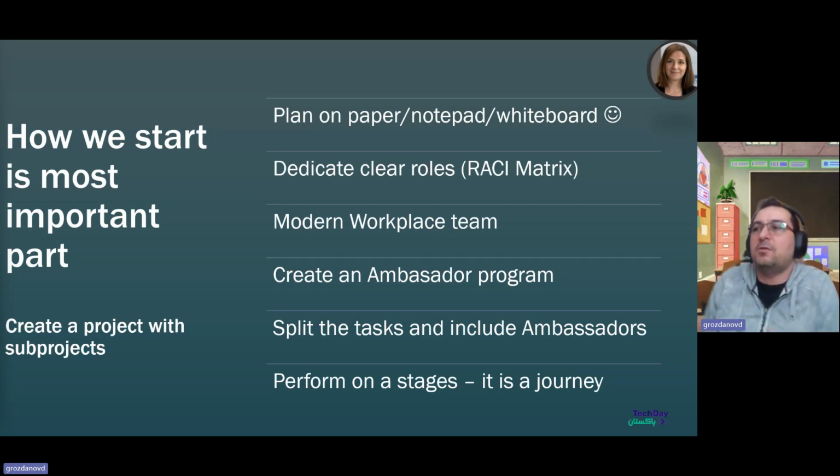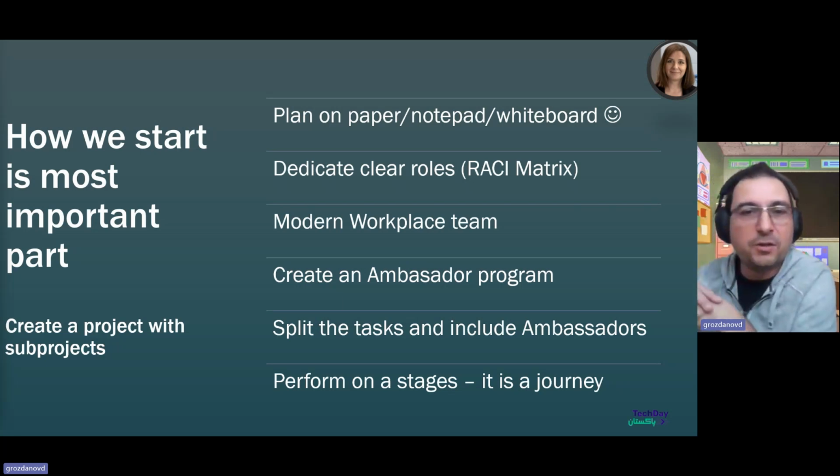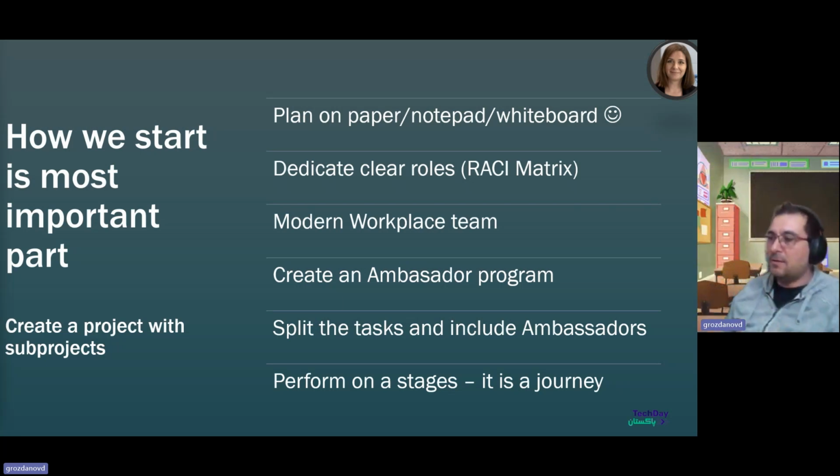So it's a construct, a methodology. It's not something that Microsoft invented. Many other cloud providers and IT professionals use it from this standpoint. We need to define who is responsible, who is accountable for a specific component, who is consulted, who is just informed. And that's the communication plan, right? Exactly. Yeah.